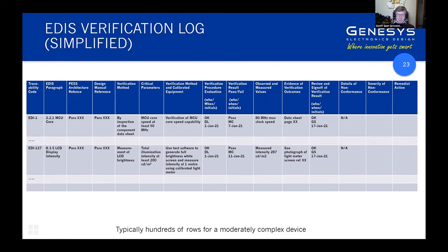So it's just following on through this. It's important that the verification procedure is signed off before the verification is undertaken. It's important the verification is done by an appropriately capable engineer who has been briefed and trained in the process, and who has not been involved in the actual design that they're verifying. So they need to be independent of the actual designer who did the design work.